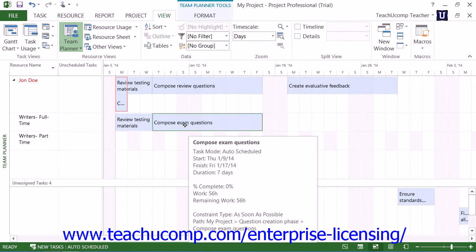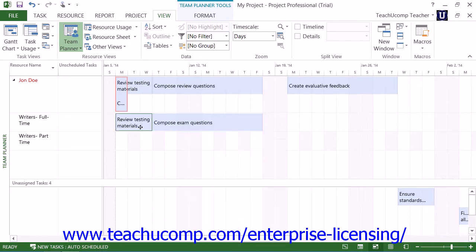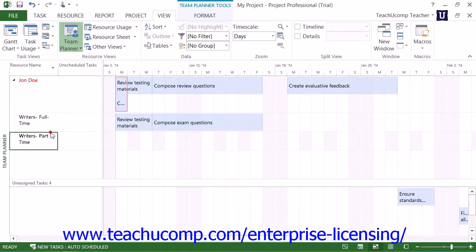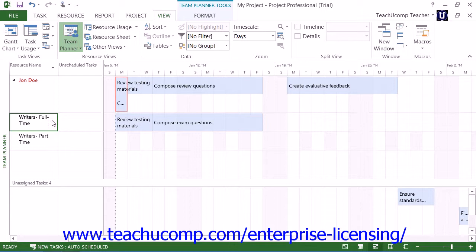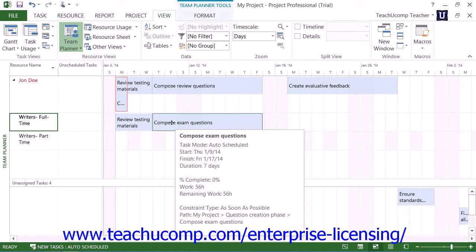Within the Team Planner view, you will see your work resources, or your team, shown in a list at the left side of the topmost pane. Each work resource is shown in its own row. All of the tasks to which each resource has been assigned will appear within the same row in the pane to the right.